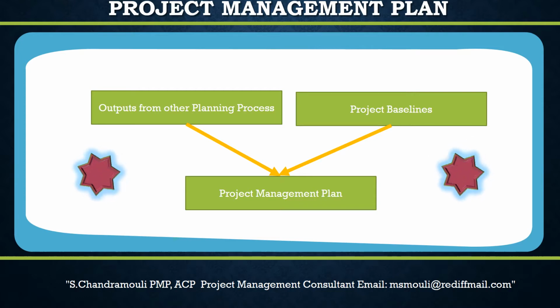The project management plan should be baselined, that is, it is necessary to define at least the project references for scope, time, and cost, so that the project execution can be measured and compared to those references, and performance can be managed. Before the baselines are defined, the project management plan may be updated as many times as necessary.